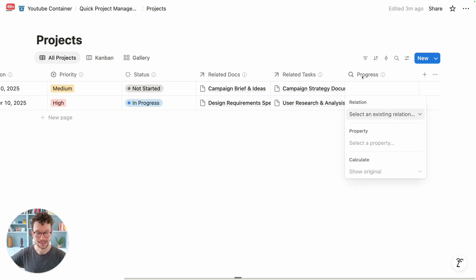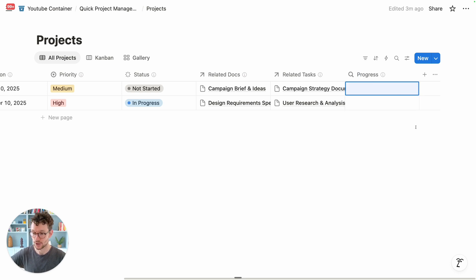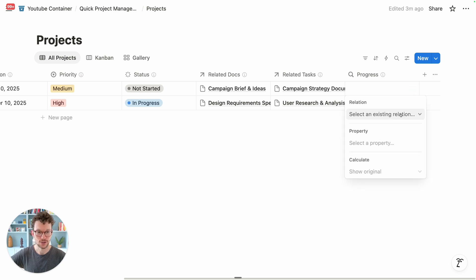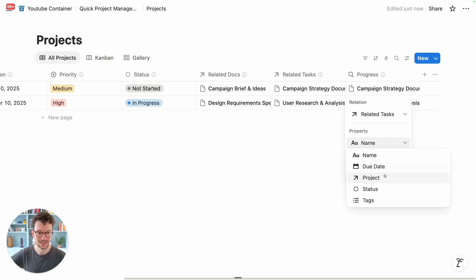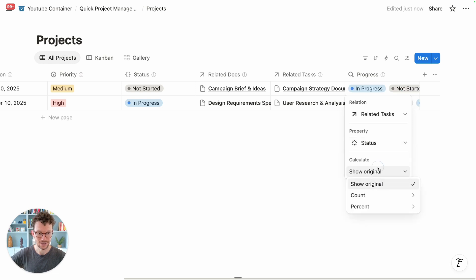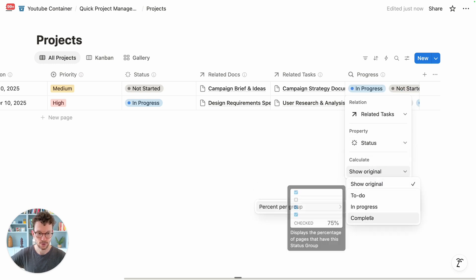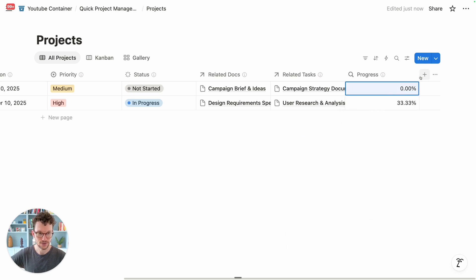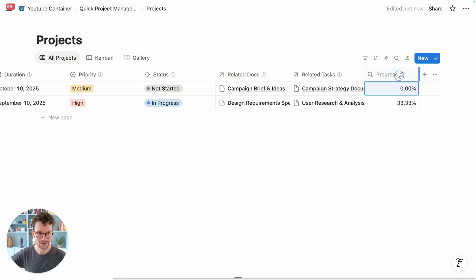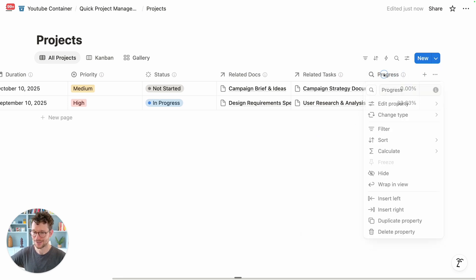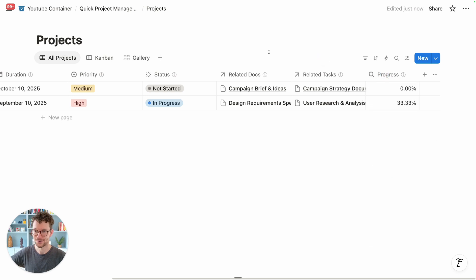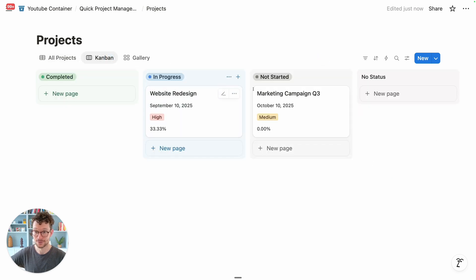The rollup is not fully set up yet, so we could reprompt it to fix this, or we just know how to do it ourselves. We need to get the status from tasks and show the percent per group completed — that way we get our progress. It's about 50/50 whether AI manages that or not.